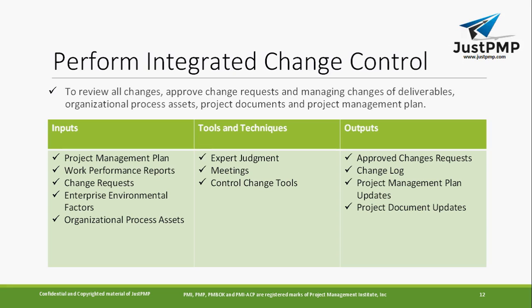Your organizational process assets may include a document that tells you what to follow when you are submitting a change request. That can also become an input of Perform Integrated Change Control. What are the tools and techniques you are going to apply on this? That's expert judgment, meetings, and change control tools.